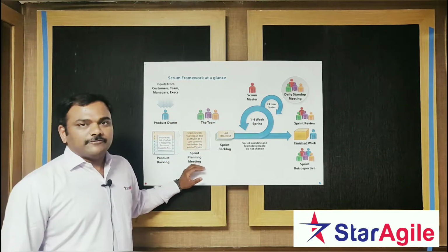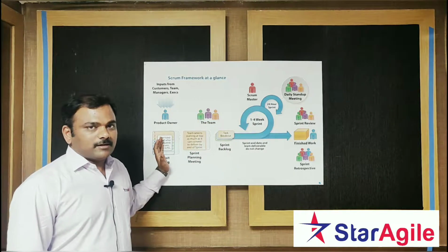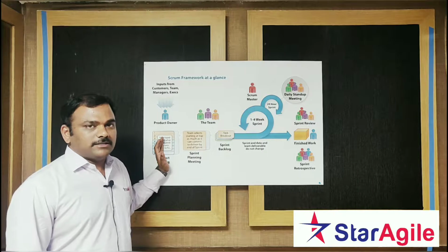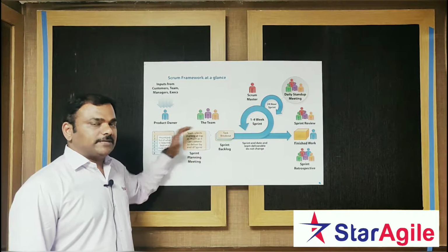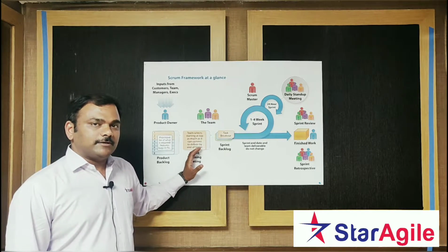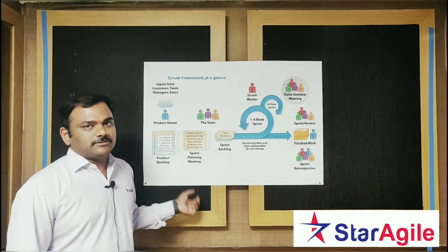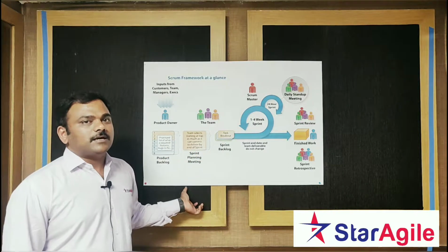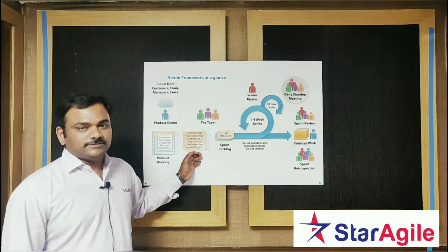So once that initial product backlog is there, he will probably meet the development team and together they are going to plan for a particular sprint, right? The team is going to go through the initial product backlog, go by the priorities set in it and decide how much work they take up in the sprint. That way the team and product owner get together and agree on a sprint goal that they will go after in the current sprint, and they'll also have a sprint backlog that has details of the features and the technical tasks the team is going to take up to achieve that goal, right?